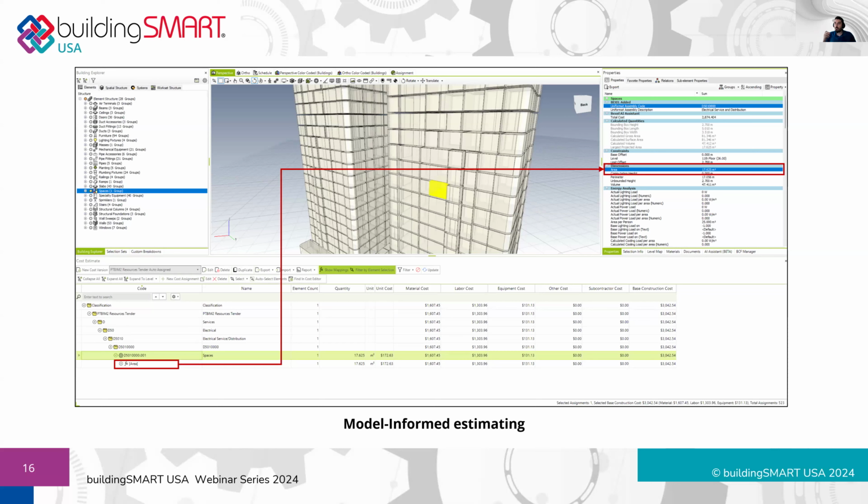So you would have a much more robust system than if you simply go and calculate it manually, because no matter how good it is and how precise it is, with the first update, it's going to crash completely. So if you simply specify it to a certain model element, like in this case spaces, you're going to have a very robust cost estimate that will evolve and work with your project updates.